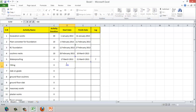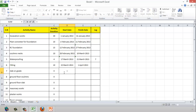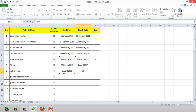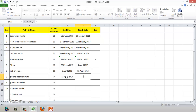Backfilling starts after waterproofing with a 1-day lag and takes 10 days. Slab on grade starts after backfilling completion with 1 day and takes 10 days. Ground floor columns start after the slab on grade and take 5 days.